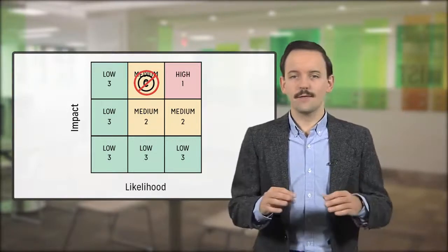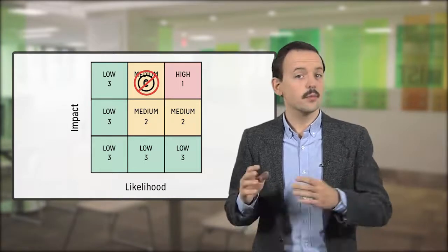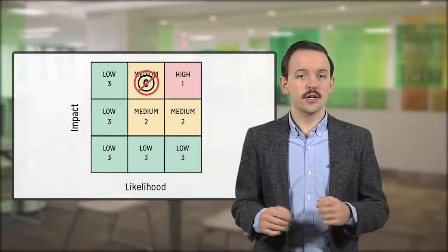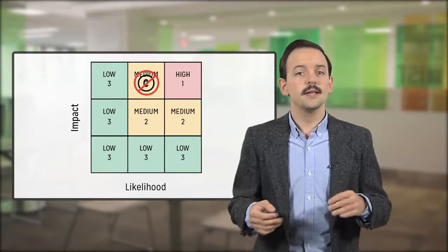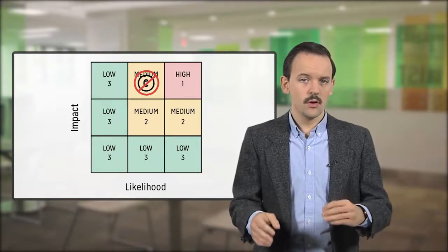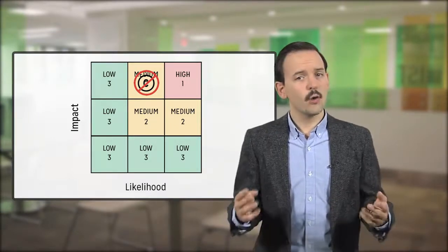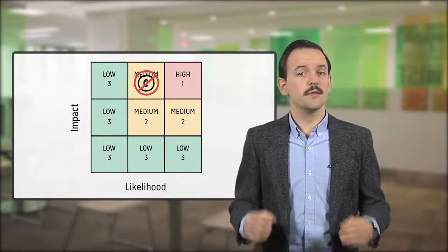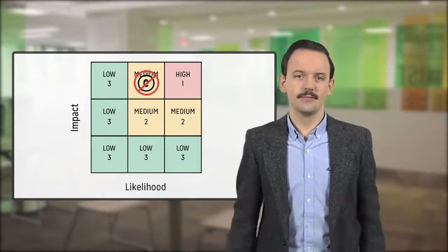You already have the first 2 columns of your risk plan done for this particular task, the risk rank and its description. An indicator that your client is not going to get copyright from the artist that they want in their app is that they're communicating this issue to you, or they're showing signs that they're losing interest in the app. An appropriate action for this risk might be that you ensure that your development team delivers the product in increments so that the client sees progress from your side.